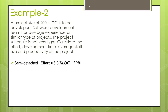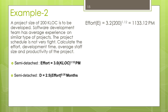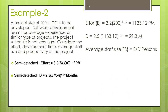This is the expression for finding effort in semi-detached mode. Put the value 200 in place of KLOC and find the effort — the unit of effort is person-months. Now substitute this effort value into the development time equation and find the development time. The development time for this project is 29.3 months. Average staff size is equal to effort divided by development time, so the average staff size is 28.67 persons.